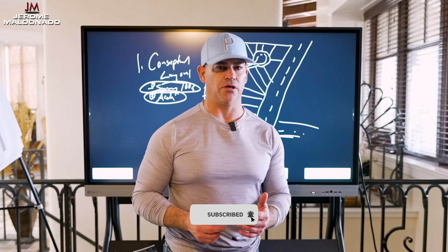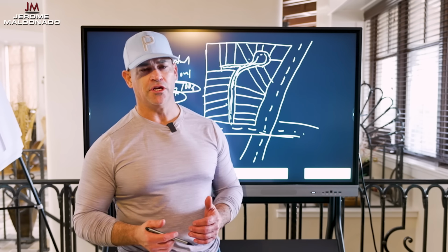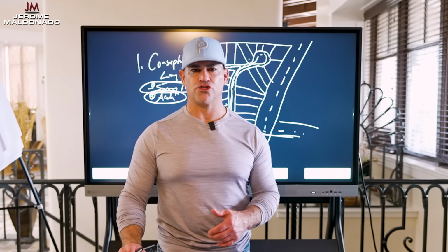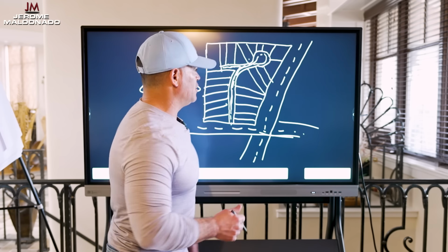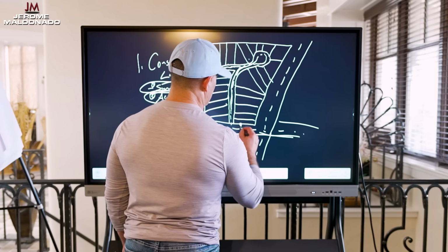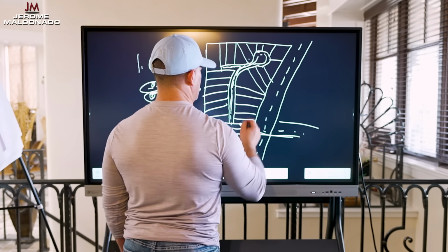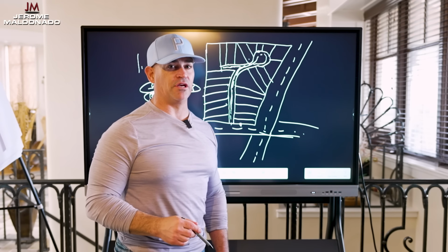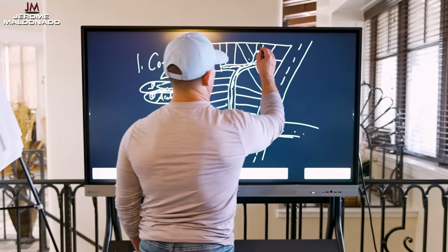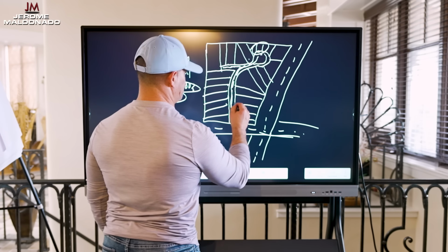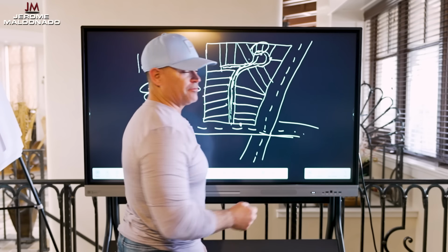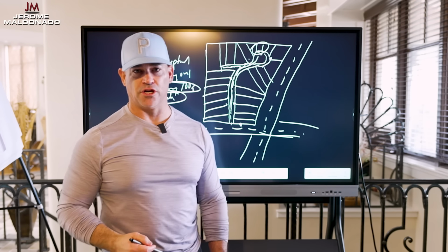So the one thing that I want to tell you is that when you're taking this into consideration, fire hydrants are a big deal, and dealing with the fire marshal's office for those fire trucks and knowing what type of fire trucks they're going to service this subdivision are very important. Because if there's a fire hydrant out here and it has to service a house out here, they don't have enough distance to be able to put that fire out. And some of the trucks are not big enough and don't carry enough water to put an entire house out. And so you may have to put in fire hydrants at different locations to service this subdivision. Okay? And so you need to know that stuff in advance.